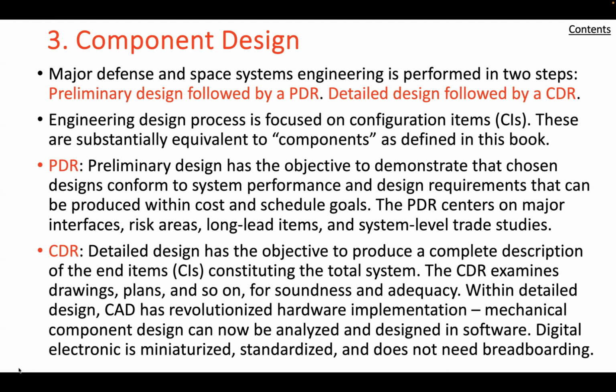The review may last for a few or many days and may require several follow-on sessions if additional engineering is found to be required. The issues on which PDR is usually centered include major interfaces, risk areas, long lead items, and system-level trade-off studies. Design requirements and specifications, test plans, and logistics support plans are reviewed. System engineering is central to the PDR process and must be prepared to deal with any questions that may arise in the above areas.